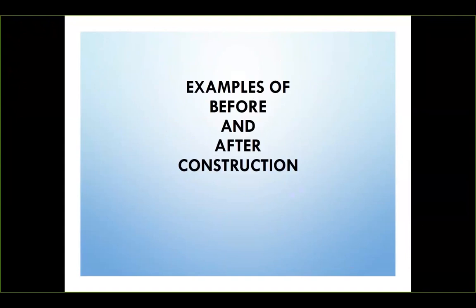So it depends on your roles and responsibilities as outlined in the construction documents and who your contract is with. Many times, our contract is with the landowner. So if we see an unsafe condition, we are doing quality assurance. We need to let the contractor know we see an unsafe condition and let the landowner know, and this is not following our plans and specifications. NRCS plans and specifications require that certain OSHA standards as identified by NRCS are being followed, and that's in those construction drawing documents. So there's a lot of policy involved with that, but our role is to identify when their safety is being compromised and let everybody know.